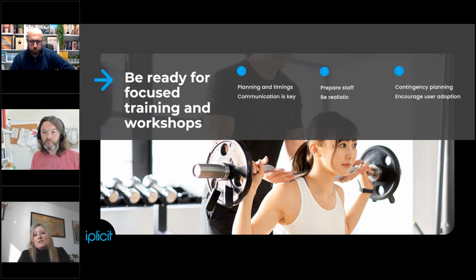So having a contingency built in to allow for those little bumps in the road or little changes off course will keep the stress levels low, and everyone knows what they need to do. Having that recap at the beginning of every session really ensures that people know what they're going to be covering. There are varying capabilities within an organisation, and so the trainer will allow for that. There could be topics that do need to be recapped later on, and there's a little contingency in the budget that we always keep back for such eventualities.